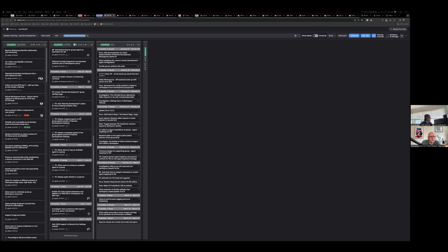So that's how this works. And it automatically calculates the velocity for the past iterations, right? Or the number of points and the number of issues they had. So they do give us all of that metadata from the past iterations that allow us to calculate all of this stuff. All of this is automatically calculated with our custom logic and the extension. This whole lane is one iteration in the database.